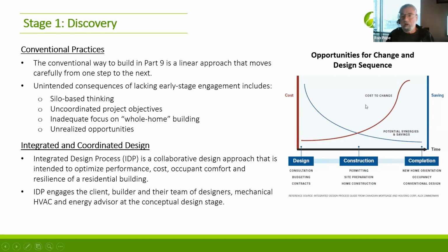You can see the graph on the right here. You spend less money up front on that linear approach, right? But you lose it by the end of the project. You spend more money up front on the integrated design, but you gain it back on all kinds of other things: your building schedule, materials used, costs of systems, changed work orders, all that kind of stuff, and you get better value as well.